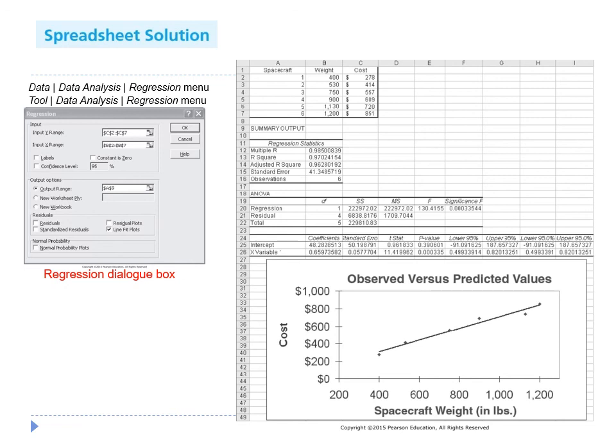Here are the solutions, carried out using the basic regression features of Excel. First, you can paste the data into the Excel spreadsheet as shown here. Then call out this regression dialog box using the Data Analysis, Regression menu command. For older versions of Excel, you can find the regression options under the Tools menu. To perform regression or line fitting, you only need to enter the cost and weight data for the spacecraft in this dialog box and let Excel find the regression coefficients automatically for us.